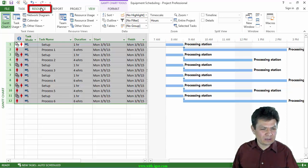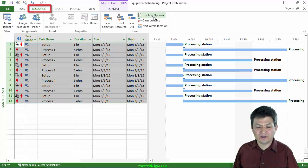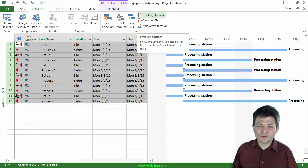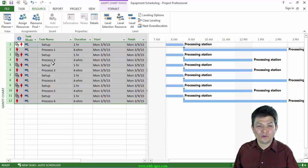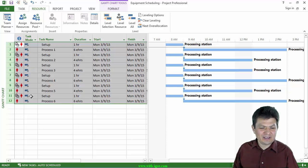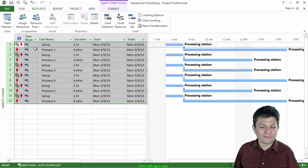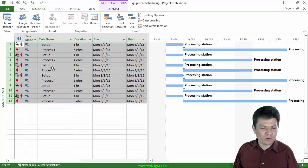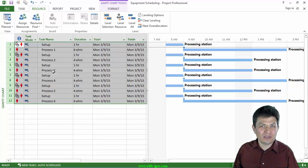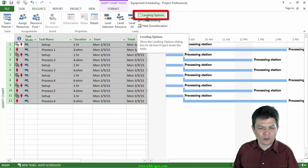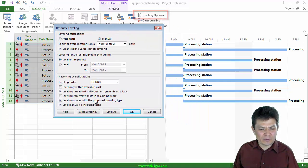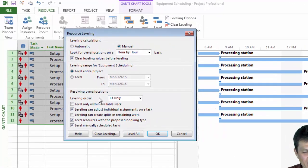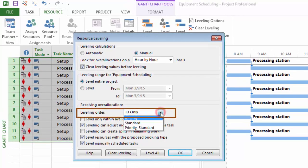And now I have multiple tasks that are scheduled to run in parallel, but they have only one resource assigned to them. And now it's time to level them so that we can distribute our tasks around the availability of the processing station. So I'm going to click on resource and I need to level. But here's what's interesting. It's really important that this particular workflow, you want to make sure that your tasks are sequenced in the order, not linked, but sequenced in terms of your screen, your list of tasks, in the order in which you would like them to be scheduled. So now I'm going to click on the leveling options before I level.